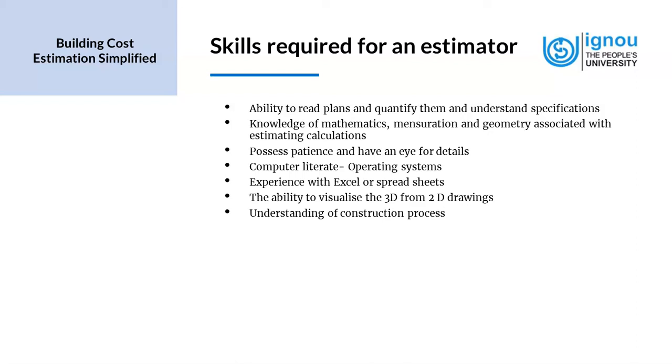If we are, say, making a foundation, then first we have to do the excavation, then the PCC, and then the RCC, etc. And so this process is important not just for the sequence, but also for how to do it. That's also important for the estimators to be able to understand the quantity which is to be taken, and also the material that is to be applied in a particular situation.